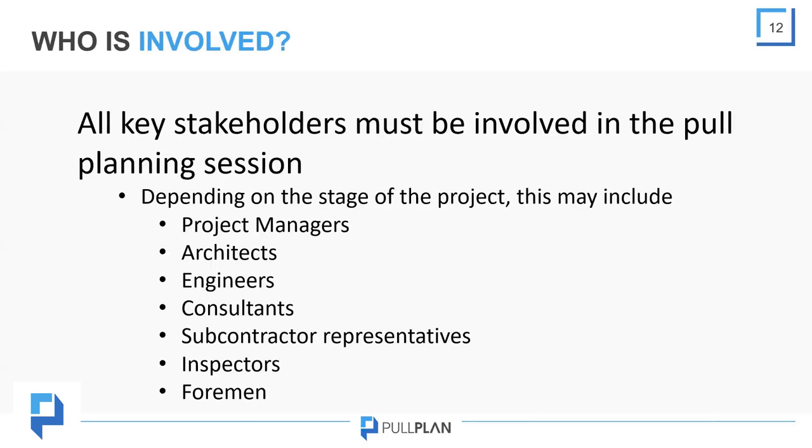As I mentioned before, it's important to get the right people involved when facilitating a pull planning session. This is one of the biggest mistakes that teams make when they're new to pull planning. They don't have the right people in the room. Now, you can hold these sessions either remotely or in person, but they're only effective with input from all requisite stakeholders. So think of it this way: every individual that owns a task within that plan should be present during the planning meeting.